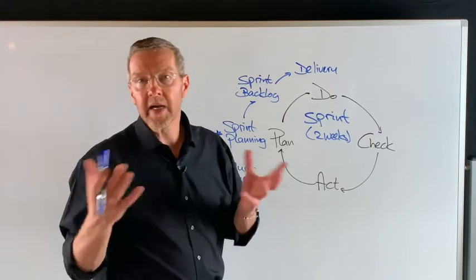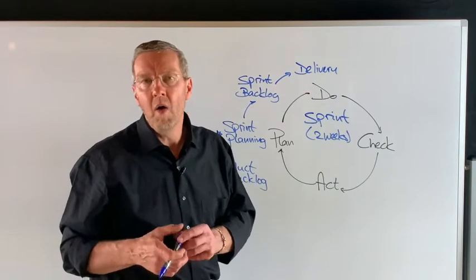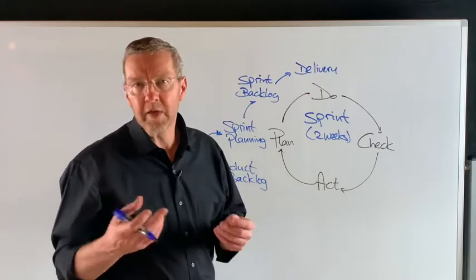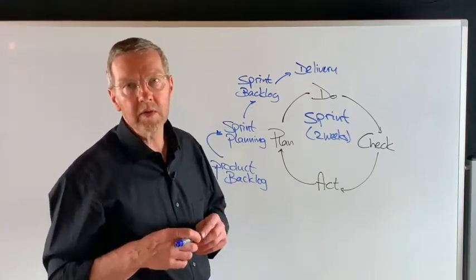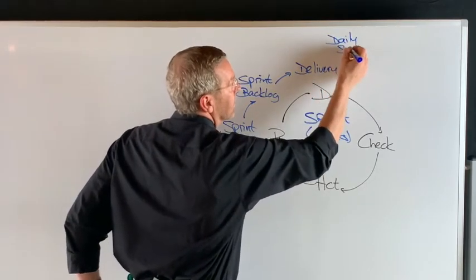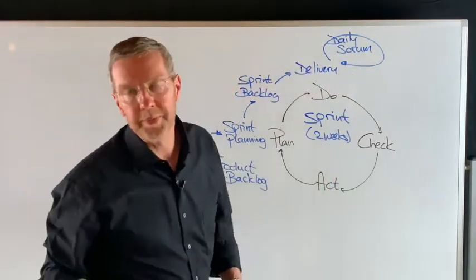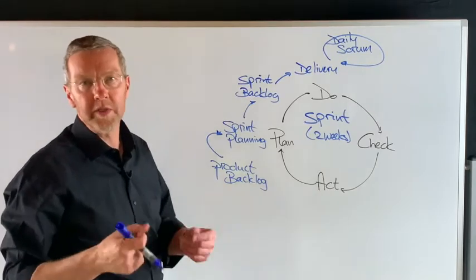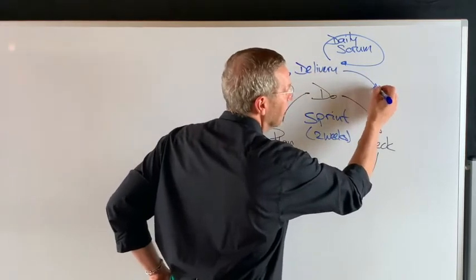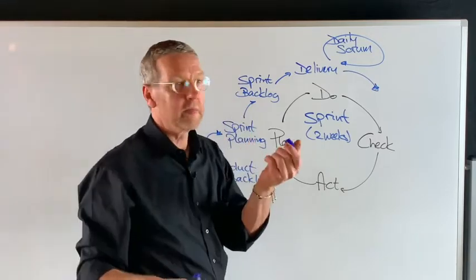That there's not somebody sitting idle or somebody stuck on a nasty CAD design problem or waiting for a supplier to come in with materials. Every day, briefly, a 10-15 minute check-in with the whole team, called the daily Scrum. Every day, a stand-up to keep rolling forward as a team. So that near the end of the two weeks, there's a true product increment ready.